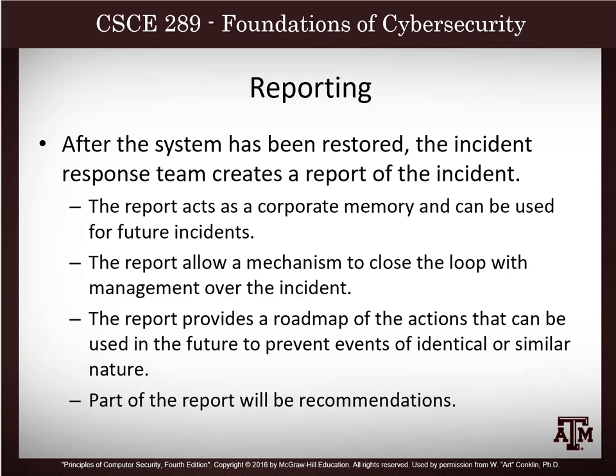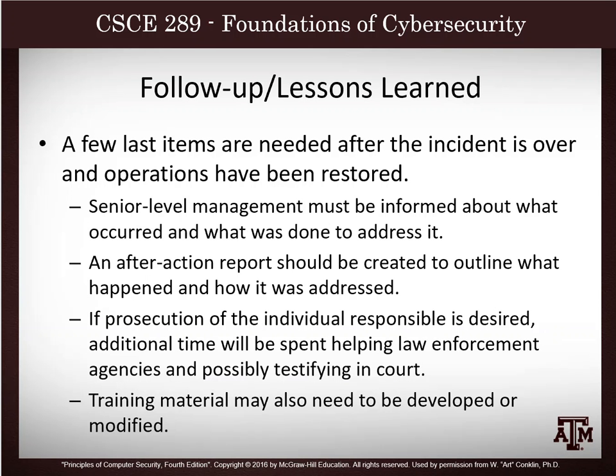You are going to have to create a report of the incident afterwards. It becomes part of corporate memory. It is lessons learned. It's how we're going to prevent this from happening again. It's a roadmap of actions. Part of it will be recommendations. Sometimes I've been in an incident where I thought they were very smart. They did an immediate follow-up and lessons learned, and then they waited 6 months and went back to see if maybe they had distilled more information.